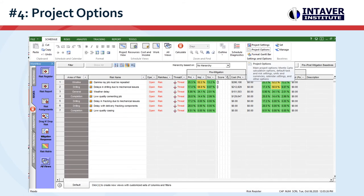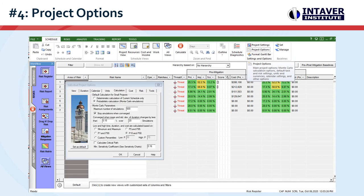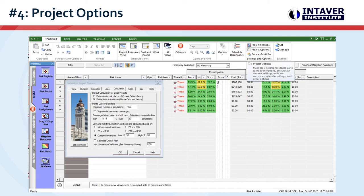For Monte Carlo simulation, the most important settings are found in the calculations and risk tabs in the project options. By default, convergent monitoring is on. If you have specific requirements or would like to run more iterations to improve the presentation of the results, you can set the number of iterations here. If you are going to use specific percentiles as targets, for example P80, you can define these here.